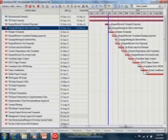And Primavera actually has a more advanced feature too that's multiple critical paths or multiple float paths, where it allows you to create a view, and it's a little bit more detailed to set up. So I won't do it as part of this demonstration, but you can actually set up a view where it'll show you not only your most critical path, but it'll then show you your second most critical path and your third most critical path and your fourth most critical path, right?